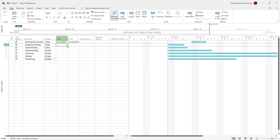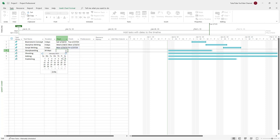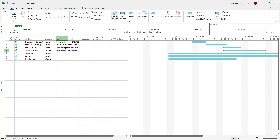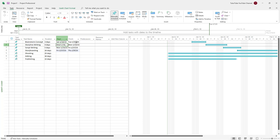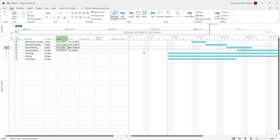Now I'm going to set the start dates. For this one I'll select the 17th, and you can see it starts lining up. Then I'll select the 18th for this one, and you can see the finish date calculated from the duration. I'll select the 23rd for the next one — Friday the 23rd. Since script writing is five days, it finishes on the 27th, so I'll select the 27th. You can see it all starts getting aligned.